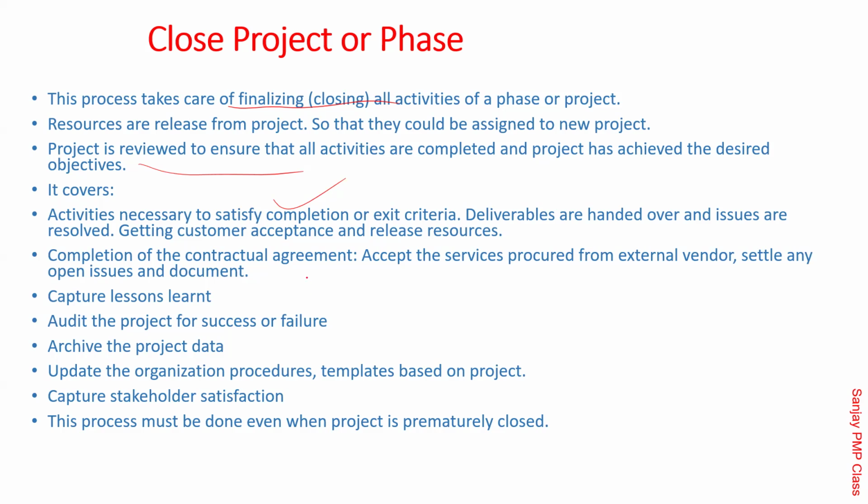Completion of the contractual agreement, very important. If there are any payables, any receivables, go ahead and mention it very clearly and accept it there with the external vendor as well. Capture the lessons learned, audit the project for the success or failure. At the end of it, it's good to audit it that way. Archive the project data, update the procedures and templates based on the project. Sometimes some templates might need a refresh, so go ahead and do it. Good time to do it when you are closing it.